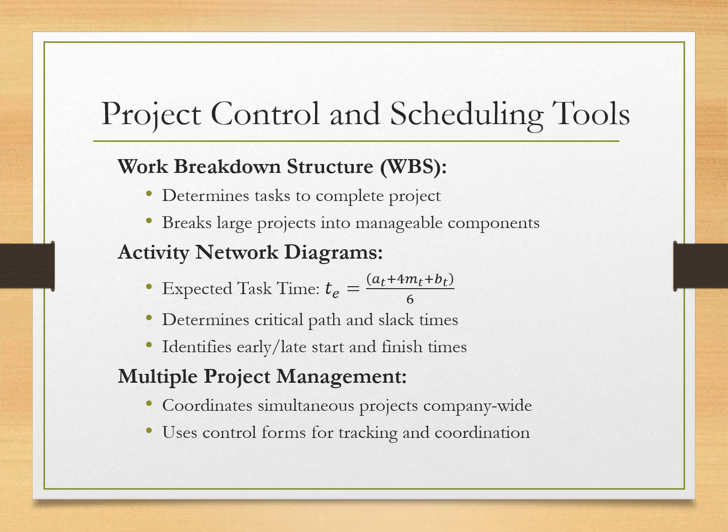Activity network diagrams map which tasks depend on others and identify the critical path. The sequence determines minimum completion time. They also show slack time, how much delay a task can handle without affecting the timeline. Critical path tasks have zero slack. Any delay affects the whole project.